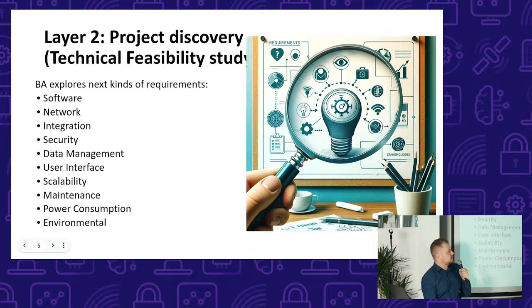Usually during this phase we decompose all the tasks to figure out, for example, what epics, stories, and subtasks the future work will have, and to estimate these tasks, to understand how much time it will take.